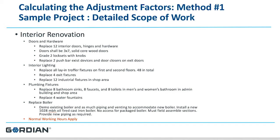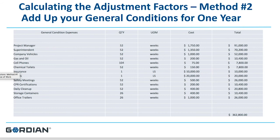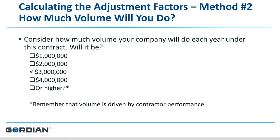Add your general condition expense and divide it by how much work you think you will do each year. General condition expenses for one year include your project manager, superintendent, pickup trucks and company cars, gas and oil, chemical toilets, bonds, and insurance. Be certain to add all of those costs up for one year. Then do simple division: divide your general condition expense of $362,800 by your estimated volume of $3 million, giving you a 12% differential. Remember that volume is driven by contractor performance.